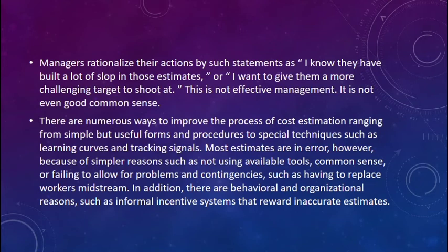It is not even good common sense. Cost and time estimates should be made by the people who design the work and are responsible for doing it. As we argued earlier in this chapter, the PM and the team members may negotiate different estimates of resources, needs, and task durations, but managerially dictated arbitrary cuts in budgets and schedules almost always lead to projects that are late and over budget.